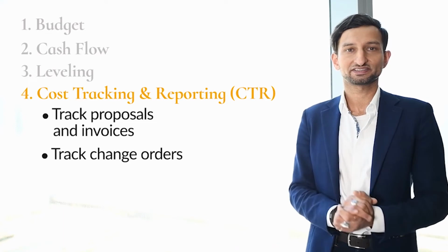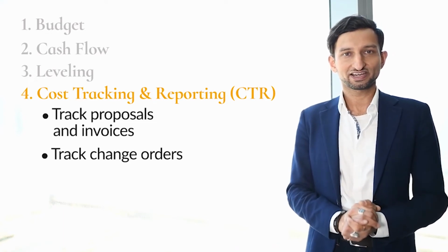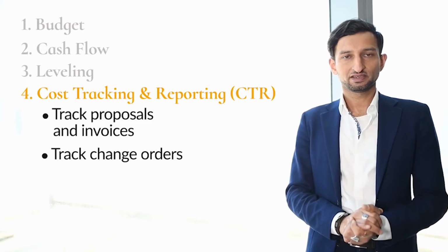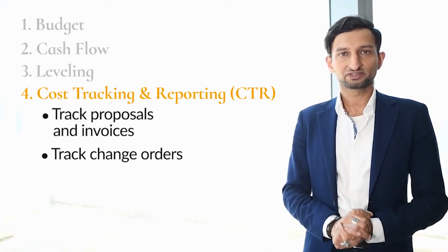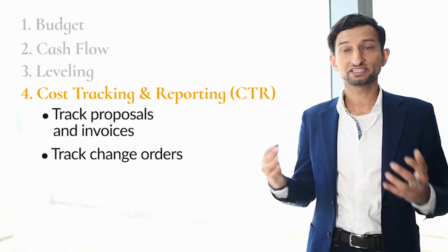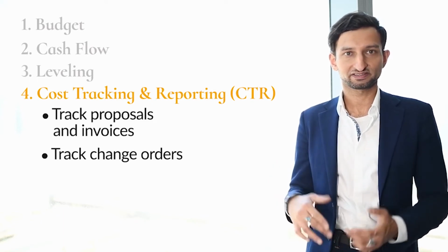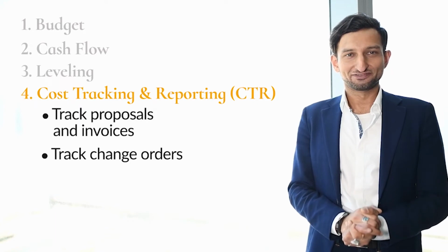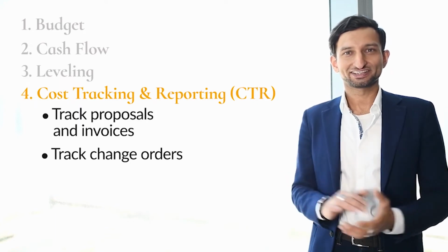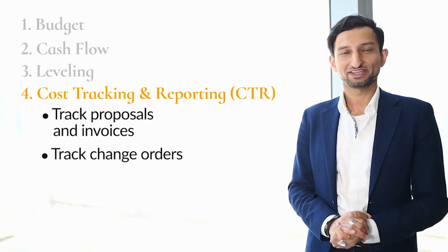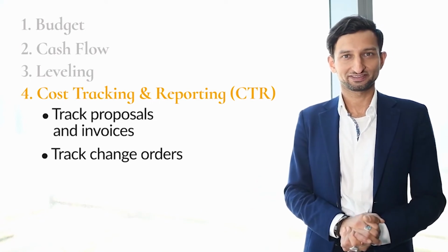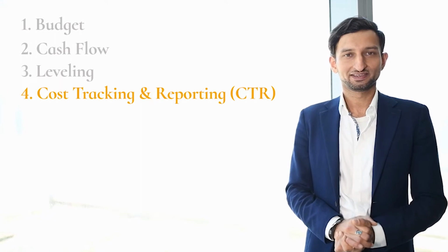When processing invoices, a properly defined CTR will show you the progress payments and balance remaining per vendor on the whole project, as well as the relationship between your budget of planned costs and the real hard costs actually spent on the project. The cost tracking report is one of the key templates and services we offer here at Arcobee. You can use your CTR to hold your vendors accountable, as plenty of them like to bill early because they just do, and also to manage the flow of your payments. So cost tracking ultimately feeds back into both the cash flow analysis and also into the project retention, which we'll talk about as number 6 in this video and article.